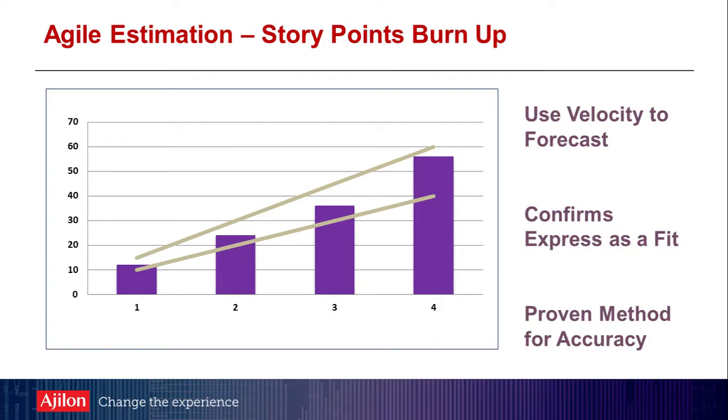So what you have along the left axis is the story points, and the bottom are the 4 cycles, design and construct. The green bands there are a range of where we estimated that we'd fall, and as you can see, we tracked pretty well. We had quite a good week at the end there, but always within those bands.